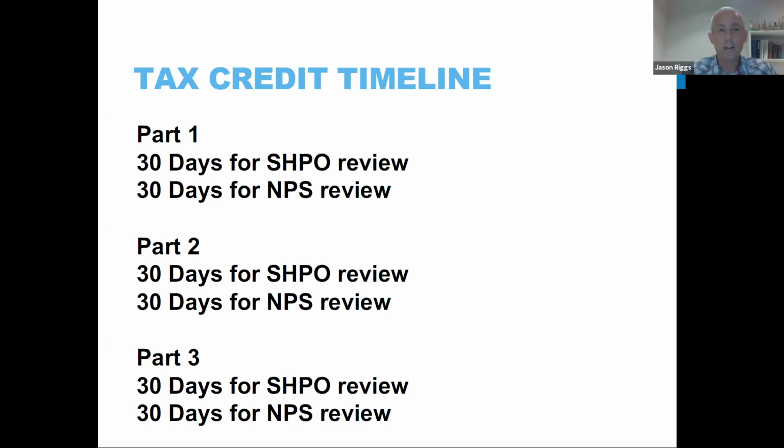So the part one, the evaluation of determination of significance, that is done. Like Nathan said, we would do the as-built floor plan and key all of the interior and exterior photos to that floor plan from the vantage view the photos were taken, as well as the historical research to date the building within the period of significance and also show where it is located on the federal and/or